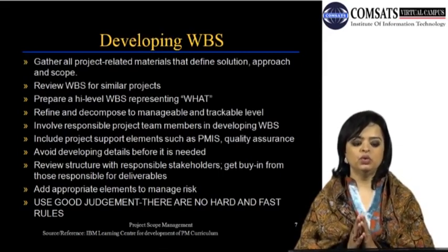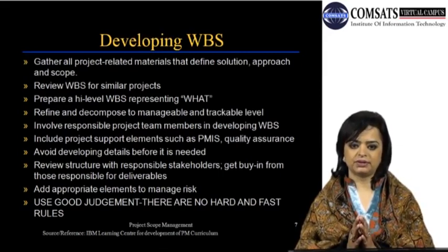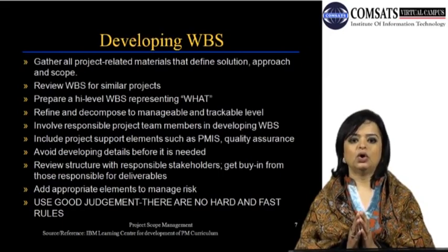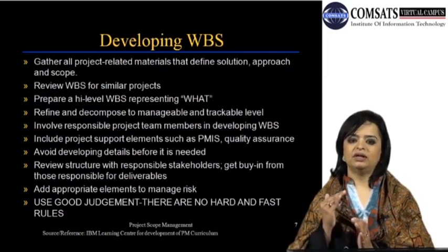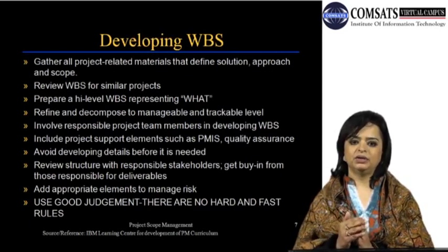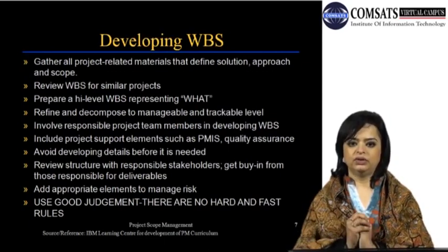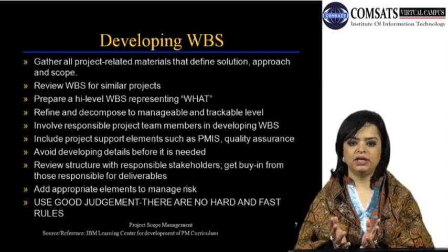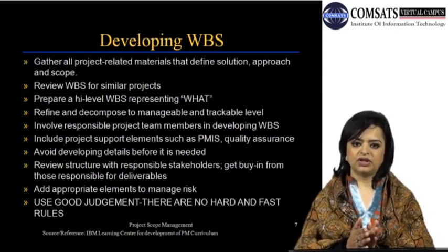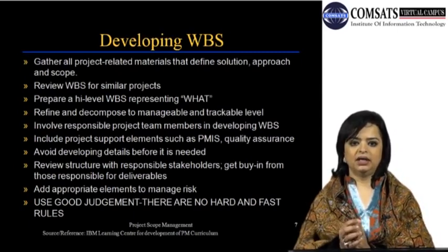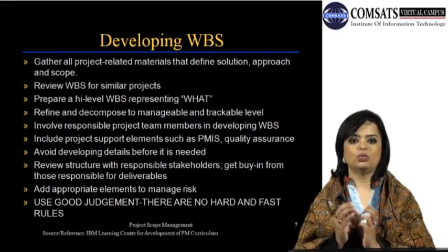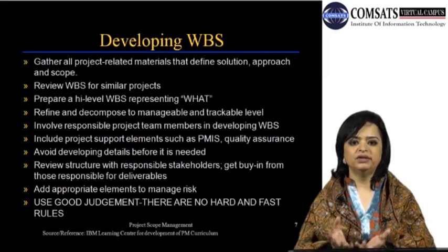Second step would be to review WBS for similar projects. It's always an asset to have activities that were done to create similar projects. Now when you have collected all of the relevant documentation, and you have seen WBS of similar projects, you start off with a high level WBS, and that should only represent what needs to be developed.